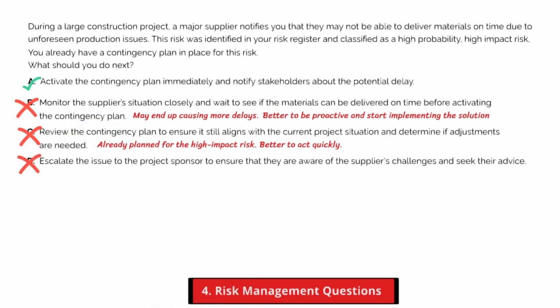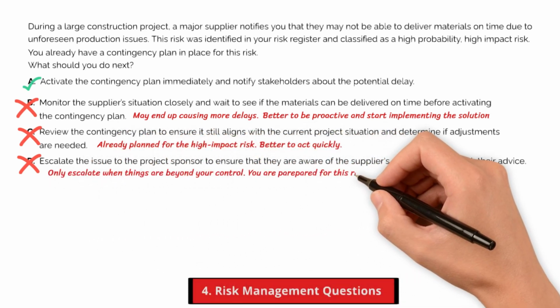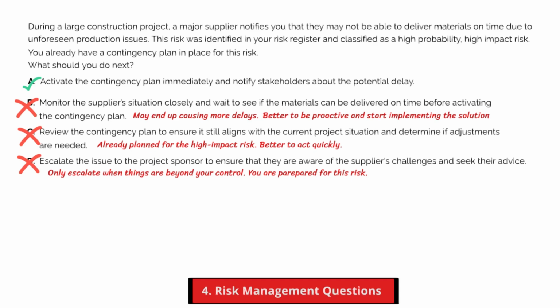Option D, escalating to the project sponsor should be reserved for situations where you don't have a plan in place or when things are beyond your control. Here you've already prepared for this risk, so there's no need to escalate right away. Okay, let's move on to the next one if you are ready.